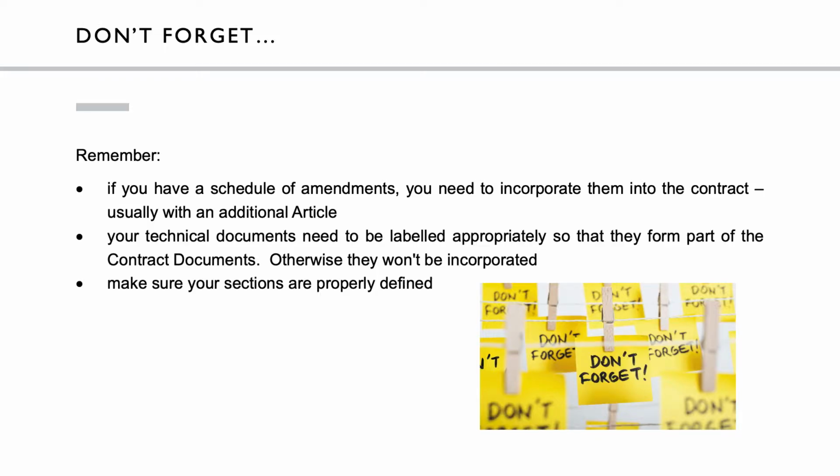Consider failure to incorporate relevant contract documents. We saw this recently in a contract for a prestigious office refurbishment. The way in which the JCT booklet was completed meant that the schedule amendments and many of the technical documents, unfortunately, did not actually form part of the contract.